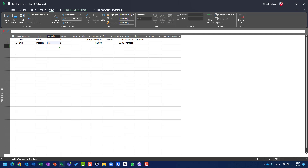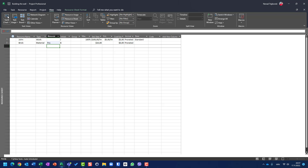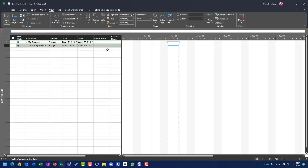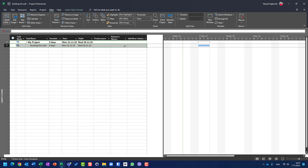Now, how to assign John and 100 bricks to the specific task 'wall'. If you go and assign from here, John and brick will be assigned, but brick is assigned as one piece. So this is not a good place to assign a material resource, except if you have only one piece, one liter, or one ton.